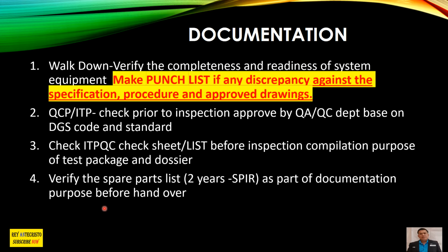Okay? So this is our job as well. During the time when I was working as a cataloging engineer, I needed to verify the vendor recommendation equipment list. I needed to verify the drawings. I needed to verify all of the schedule, and you need to check the bill of materials, exactly what is important, and later on after 2 years this will be available in the shelf area. In the shelf, that is what we call shelf life. That's why we're always putting that in the system.